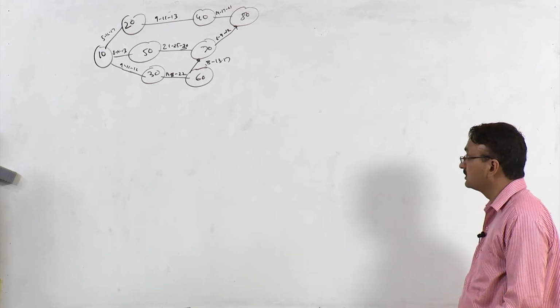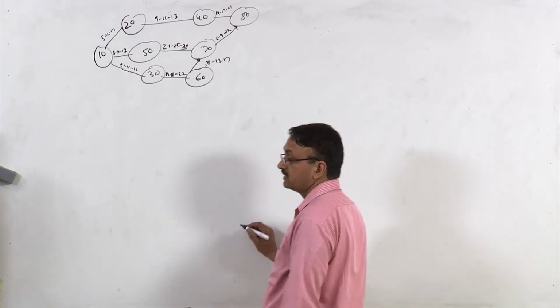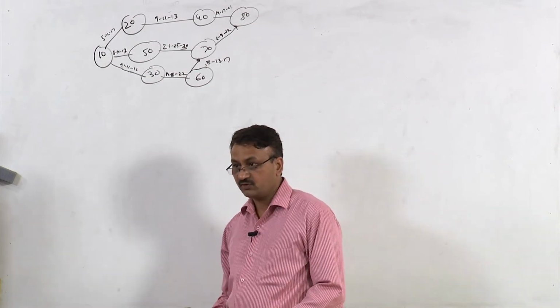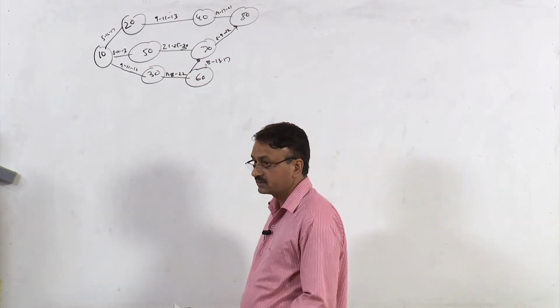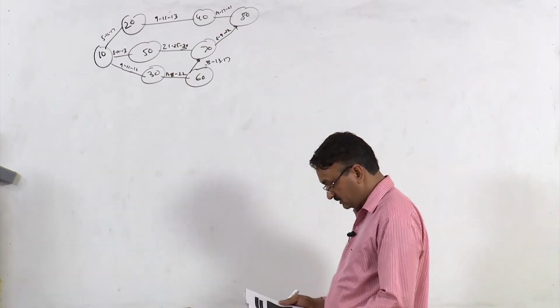You need to find out the variance along the critical path. And what is variance? It's just the square of the standard deviation. So first of all, you need to find out TE values, right? And what are those TE values?